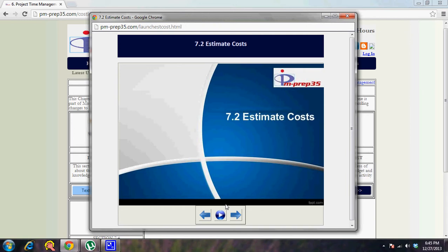But you basically look at your risk register, then you take care of your human resource plan, which has details about staffing attributes, personnel rate, because once you have the activity resource requirements, you build your human resource plan. The human resource plan is a summary of what types of resource are needed, what quantities are needed, and it also accounts for the personnel rates based on market conditions and things like that. So you pick up that information from your human resource plan, and then that becomes a feed to this particular process. So human resource plan is an input.